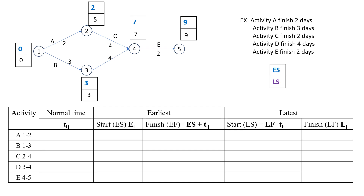First, draw a tabular column and write activities along with their normal times. Activity A is 1 to 2 with normal time Tij of 2. Activity B is 1 to 3 with Tij of 3. Activity C is 2 to 4 with Tij of 2. Activity D is 3 to 4 with Tij of 4. And activity E is 4 to 5 with normal time Tij of 2.